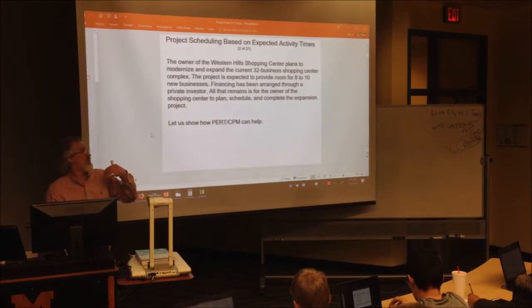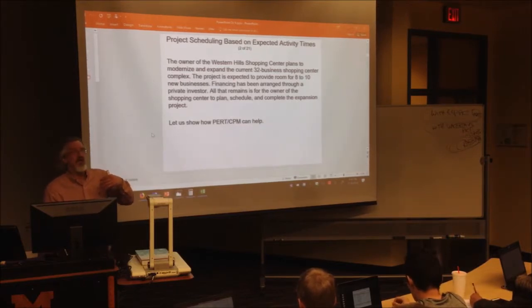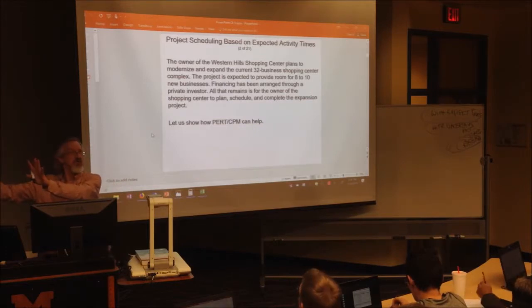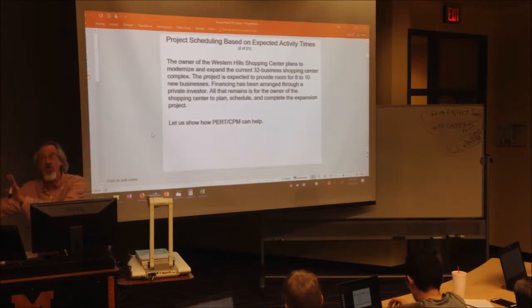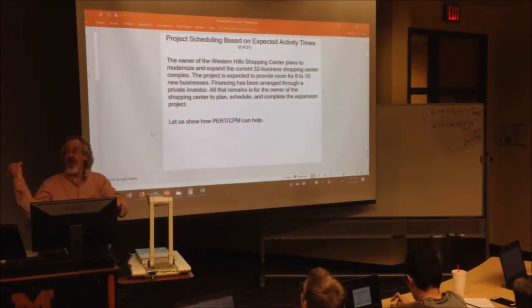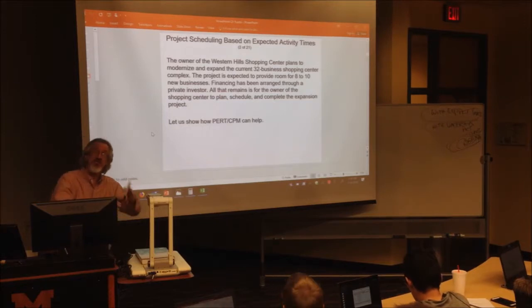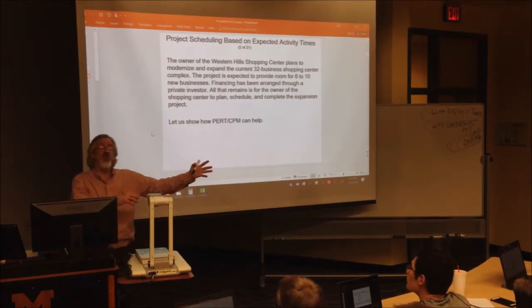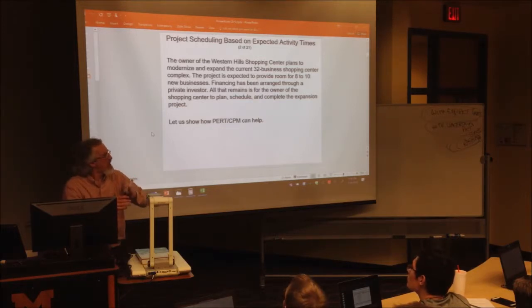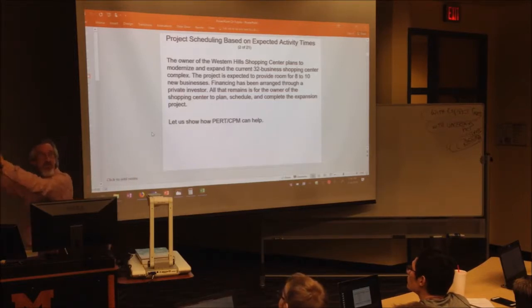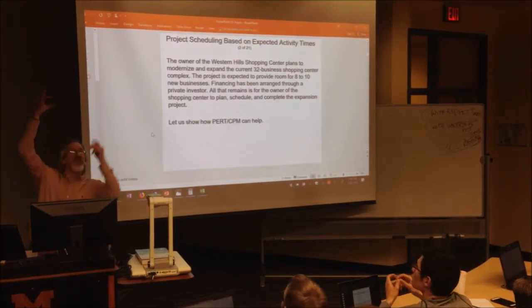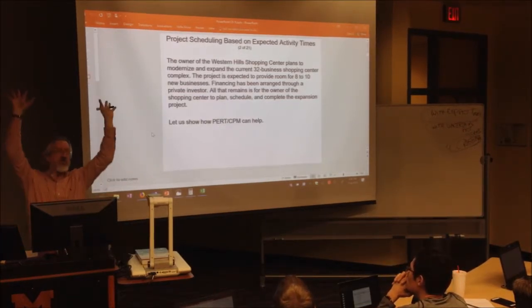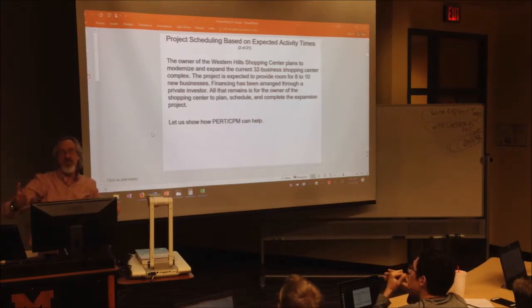One more example. When we're working on a building, it's always like, the drywall is next. Well, what has to be finished just before the drywall goes up? The electrical wiring has to be finished because you cannot put drywall up until the wires are behind the wall. The plumbing has to be done just before the drywall. The studs are before the drywall, but not just before it. Right before the drywall is the electrical wiring and the plumbing, because once all those boxes are in place where outlets and light fixtures are going to be, the drywallers can come in and start putting up the drywall. That's the immediate predecessor.